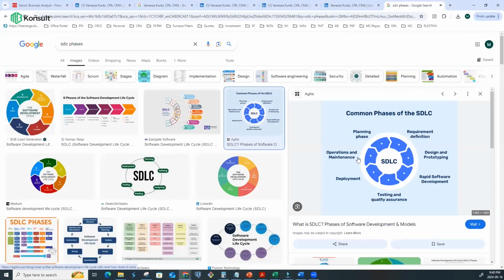That's what I'm saying, right? And then you talked about operations. Operation is now you've deployed. It's now in use. And I like the way you said you also still continue to monitor. What I missed there was that one of the key things you want to look into after you deploy is user adoption, and then training. So somewhere between testing and deployment, you need to put training there.